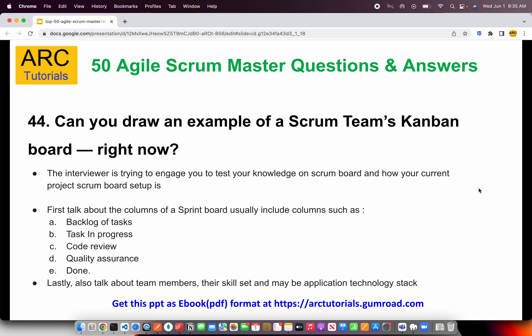Can you draw an example of a scrum team's Kanban board? This is a real-time question asked to see if you have really worked and have some understanding. The interviewer is trying to test your knowledge on scrum boards and wants to know how your current project scrum board looks. Some columns to talk about are: backlog of tasks (the to-do list), then in-progress, code review, QA or testing, and finally done. These five are the common columns present in most clients or enterprises. Also talk about team members and their skill sets, and which columns they will be working on.